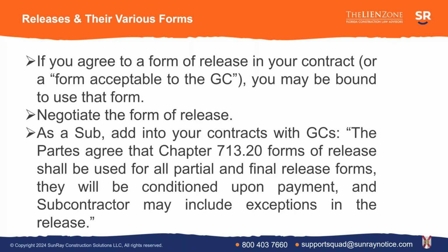I want to repeat myself. If you sign a broad form release through a date certain and you have prior claims, you are releasing all of those claims from your future right to collect them. So having the right to include exceptions in your release is important.